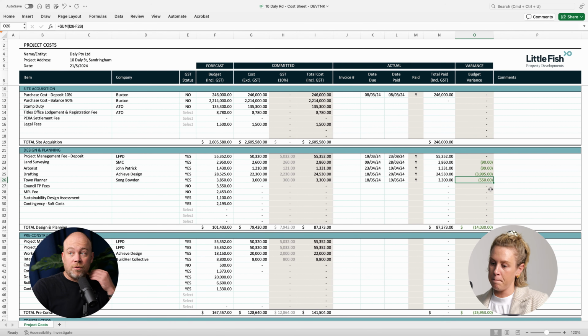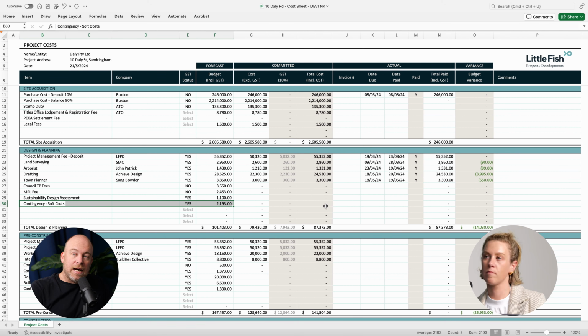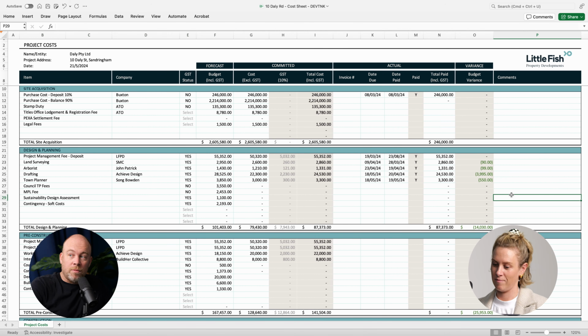But by the look of it, there's some green in that design and planning stage, which like you said, Claire, the team genuinely gets pride out of stacking some green numbers, because let's be honest, you're probably getting close to a red at some point when something doesn't happen as you want it to. But if you can stack a bit of buffer there, and as Gav went through, he does allow some contingency inside the back end of his feasibility, so if you can get a little bit ahead, when a red invariably pops up, you can cover yourself. I knew that was coming.